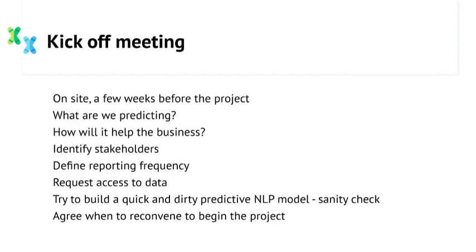In the kickoff meeting, we need to discuss again what the client is trying to achieve. We need to ensure that there's agreement on the following points. What are we predicting? How will it help the business? Has the business attempted this before and what happened? How long has the organization been gathering data? Does the business have a preferred cloud provider, such as Microsoft, Google, and Amazon?